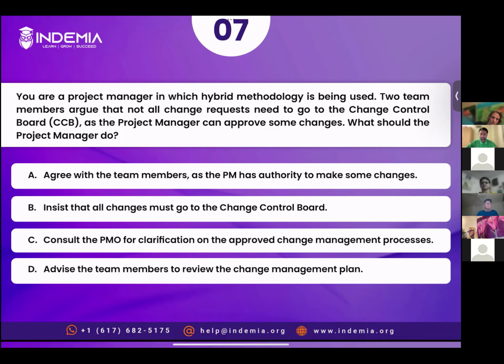required to the project. All right. So the problem here is who is authorized to process changes? The problem is about misunderstanding or lack of understanding about authority levels. So remember, authority levels regarding the change process are documented in the relevant management plan. The change management plan is a document where we document the entire process with steps and procedures, roles and responsibilities of different actors who are responsible for change-related activities, and their relevant authority level.